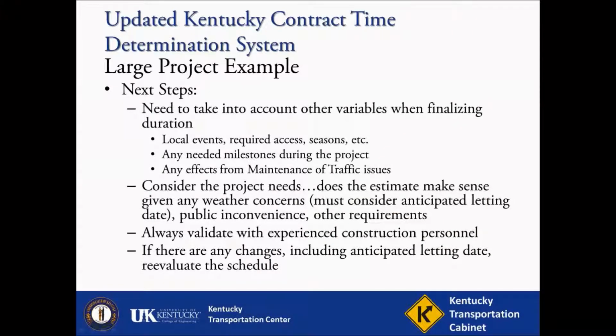Once you have completed the contract time estimate, there are some final considerations. Consider local events, needed milestones, and other variables on the screen. Also consider the project needs. Does the estimate make sense given any weather concerns, especially in terms of the anticipated letting date, public inconvenience, or other requirements? Always validate the contract time estimate and proposed contract time method with experienced construction personnel.